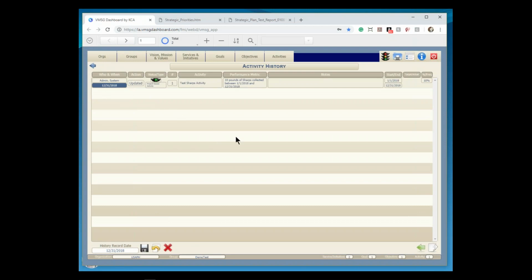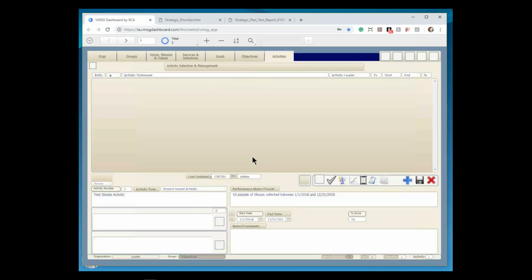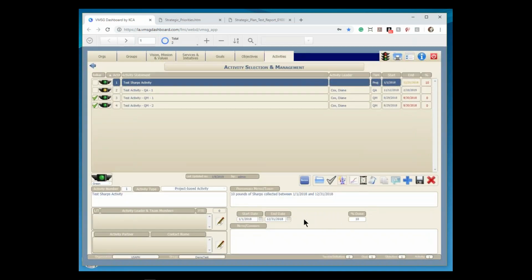So now I can do that if I want to go back 6 months, and let's say I want to do it every month. I save the data from my activity here, and I save it as it was on that date. So even if I have this beginning and ending date, which really doesn't matter a lot, let's say back on 6/30, we were at 5%.